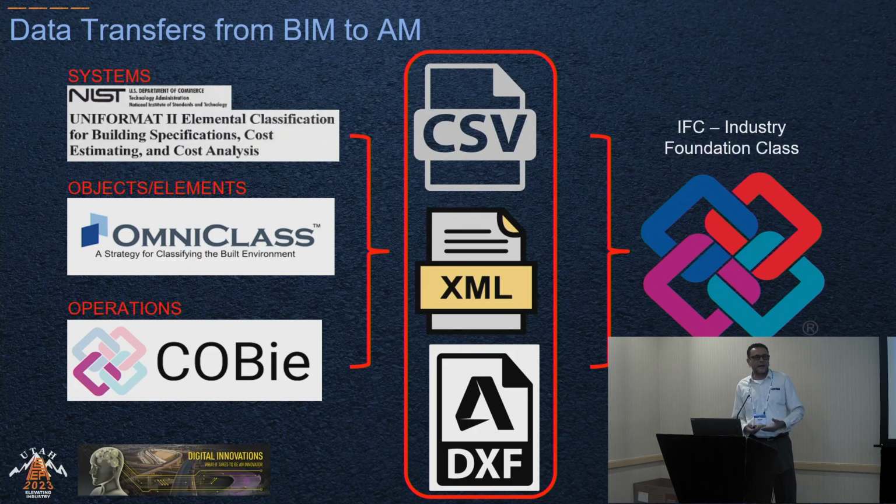The other great thing about IFCs, we love this at AECOM. I started doing it 7 years ago when I joined the company. Model handover. When we hand over models and we translate models and we give models away at the end of a project, we write into our contracts, you will get an IFC. You're not going to get a DGN file unless you call for it. You're not going to get a DWG unless you specifically call for it.